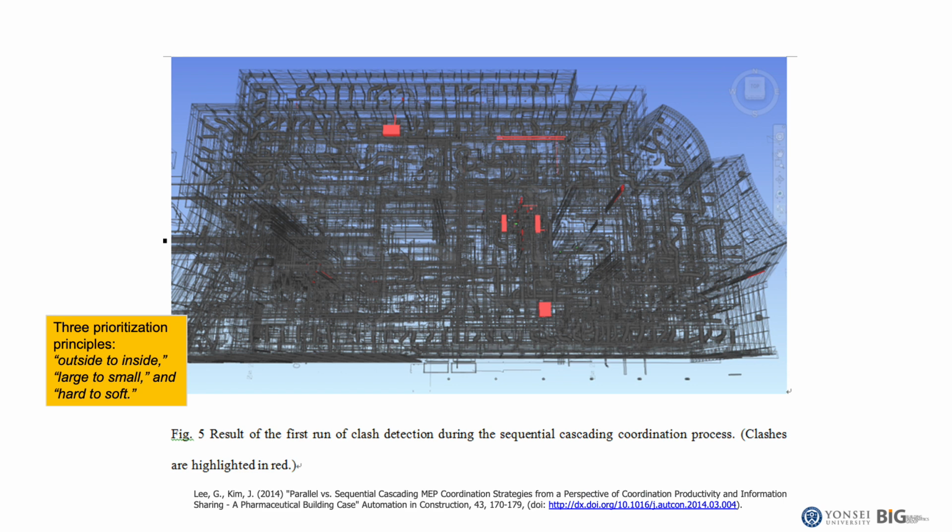On the other hand, the second coordinator asked project participants not to work at the same time, but to wait until the modules of the subcontracting work with high constraints were finished. We refer to this approach as the sequential coordination strategy. The case study shows that the sequential coordination strategy was 3 times faster than the parallel strategy, and also left only a small number of manageable errors as shown in this diagram.